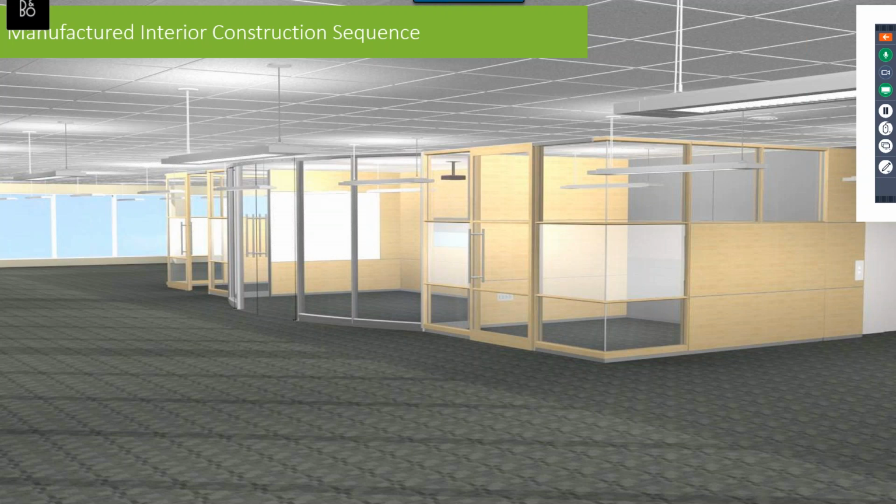It sounds a little counterintuitive, but we have no standards. There aren't a bunch of 4x8 assemblies in a warehouse that we've been told to offload. Every project is manufactured to the specifications of that environment. So that 3 to 4 week lead time that I talked about, we go in and do site dimensions in a warm shell. The design of where your sprinkler heads would be is part of the same set of drawings that these assemblies would be. So we're making sure that there aren't going to be interferences with the top edge, in this case of a cornice height or a short of the ceiling height wall, and where a sprinkler head needs to be. So all of that coordination is done in the architectural files.